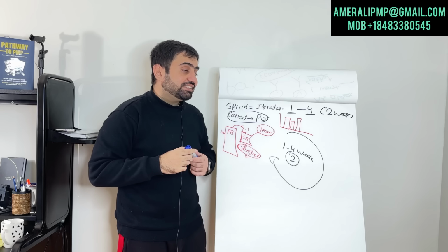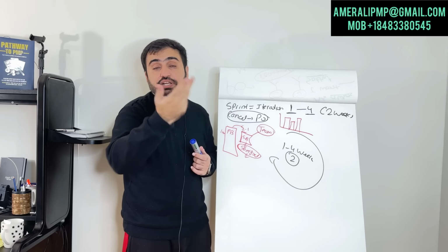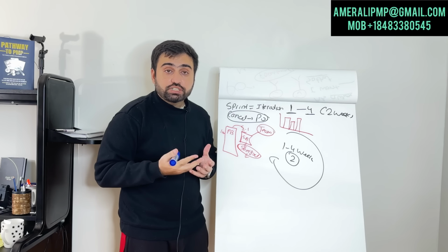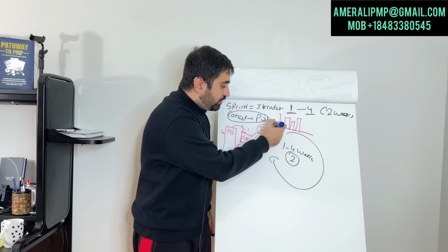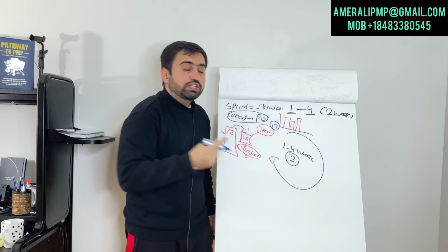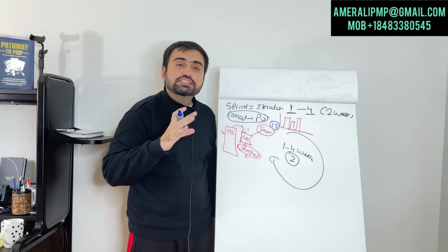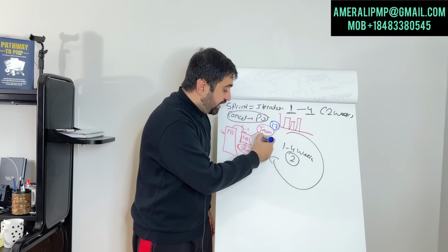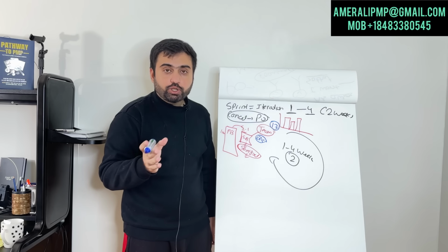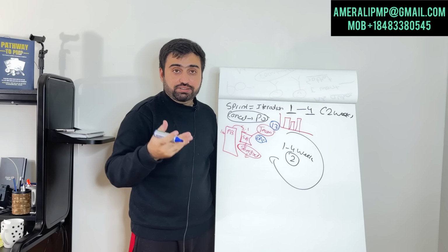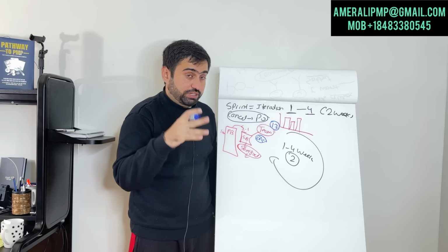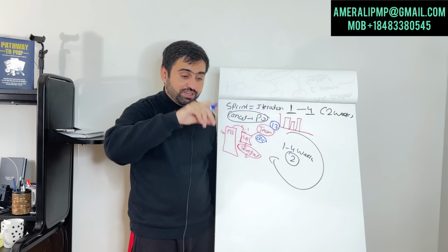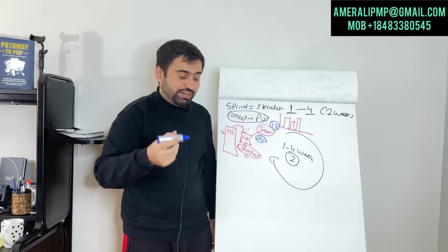Okay. Let's say there's a user story that is bigger than even the velocity. The velocity of the team is 13 story points, let's say. And you have a user story that is 20 story points. This is called an epic. We will break down that user story into small equal parts that we can complete in the sprint. We will not increase the length of the sprint. Important point. Write it down, take notes, maybe wherever you're taking.